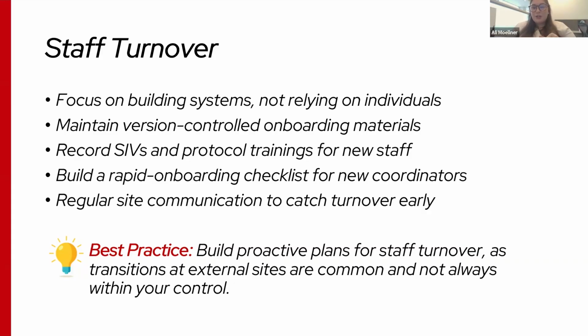It's great if you can record your SIVs at each site so that, say you get a new coordinator, the coordinator can watch that and kind of be onboarded a little quicker. And then also make sure that you have a rapid onboarding checklist for new coordinators, so it's not a panic when you have coordinator turnover and you need to get someone quickly set up at the site. So that's something you should consider with study startup.